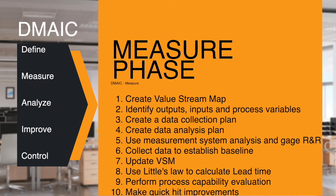Fourth, create a data analysis plan. Fifth, use measurement system analysis and Gauge R&R. Sixth, collect data to establish a baseline. Seventh, update the value stream map.